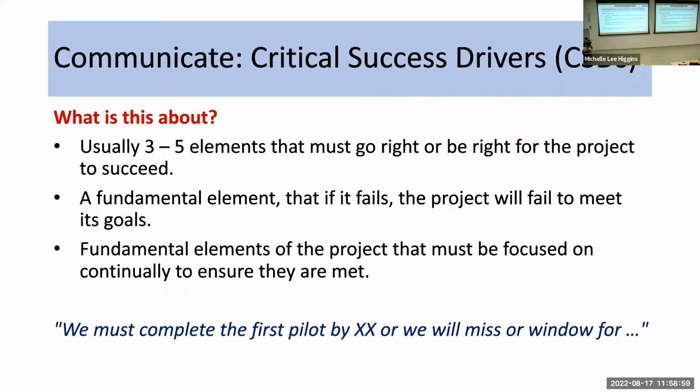Critical success drivers, yes. These are usually 3 to 5 elements that must go right or be right for the project to succeed. My example project in the summer was a camp for girls. Recruitment was a critical success driver. If we didn't recruit, we didn't have a camp. It's a fundamental element that if it fails, the project will fail to meet its goals. Fundamental elements of the project that must be focused on continually to ensure they are met.